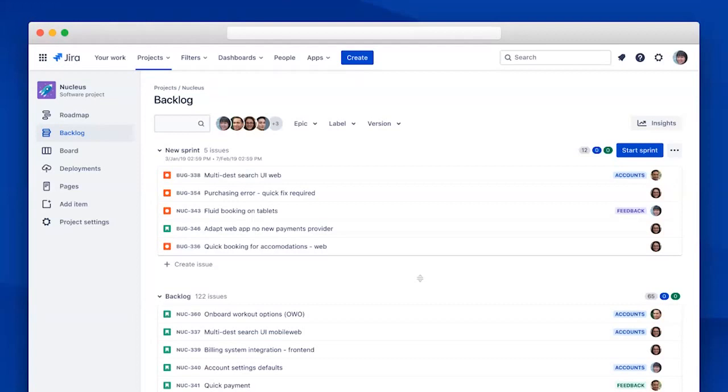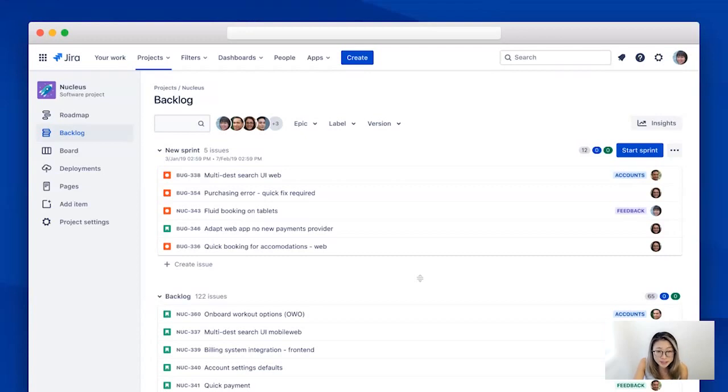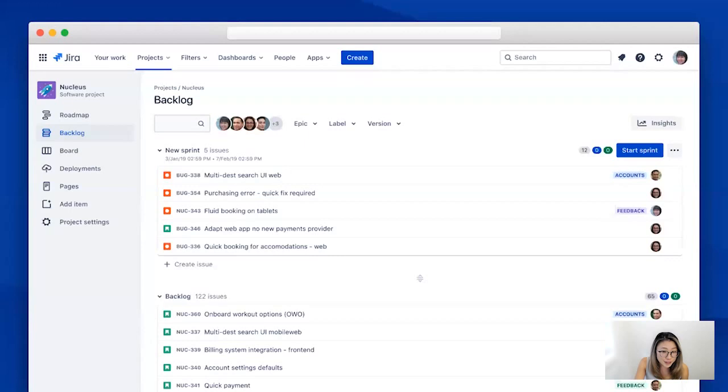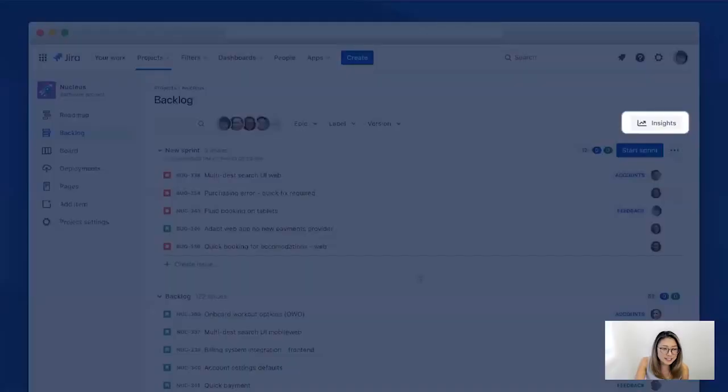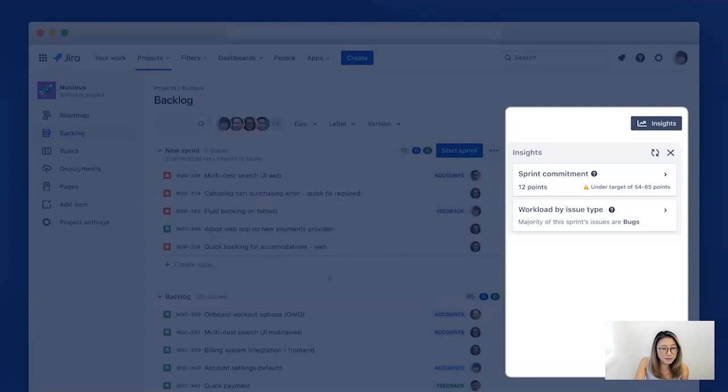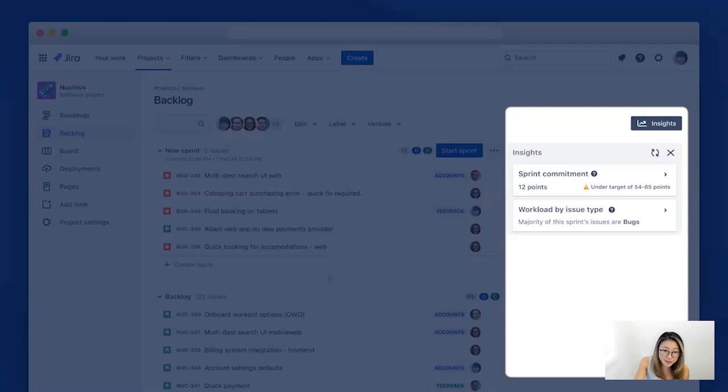Imagine you and your team are in a sprint planning meeting, ready to set those goals, deciding which work to prioritize and then discussing how much to take on. As you can see in this backlog view, you've already got a few high priority bugs in the sprint that you captured from this week's triage, and you know you need to tackle this sprint. But what else does your team need to work on? This is a great moment to click the Insights button right here, which will open up this panel. And inside the panel, you see two cards. First one indicating that there are 12 points assigned to the sprint as you see from the bugs that you've added.